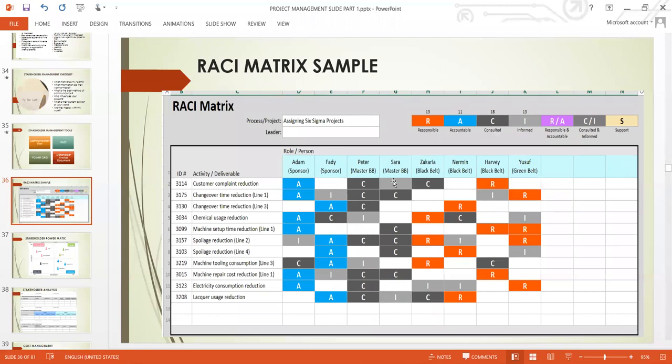So that is how you make sure that you don't overlook anything. So when you get to your stakeholders list, and this may be your team list, you plot everybody according to how you want them to fit in and participate in that role or activity. So that when you are trying to achieve that, you know whom you are meeting and when you are meeting the person. That's the importance of the RACI matrix. You can see how powerful it is and how it can help you to manage your stakeholders and your team very well.